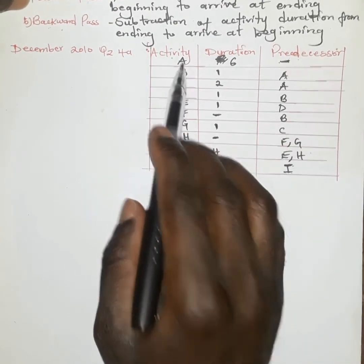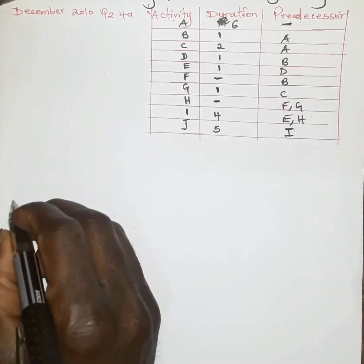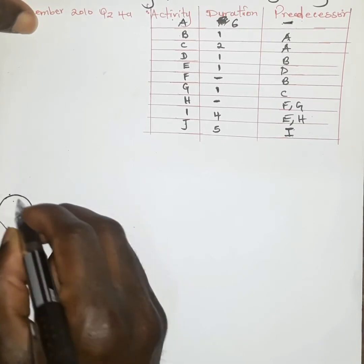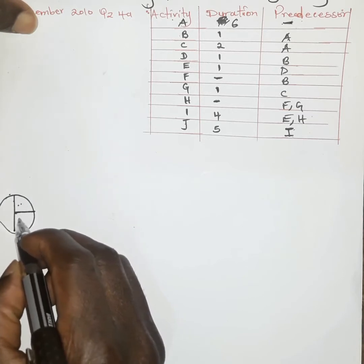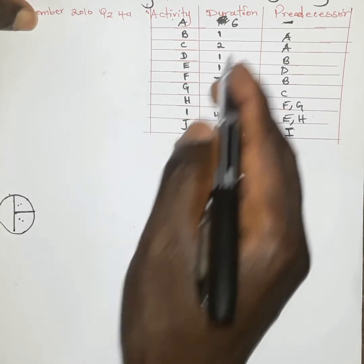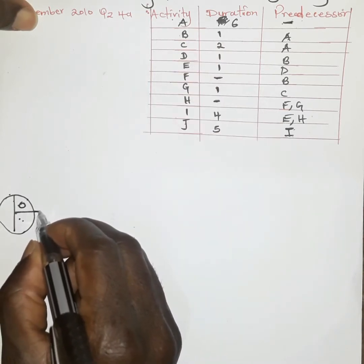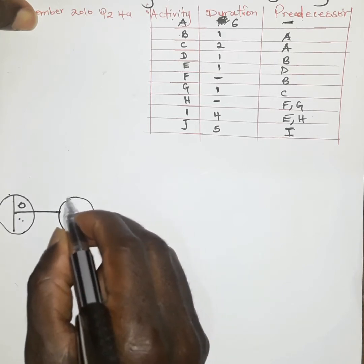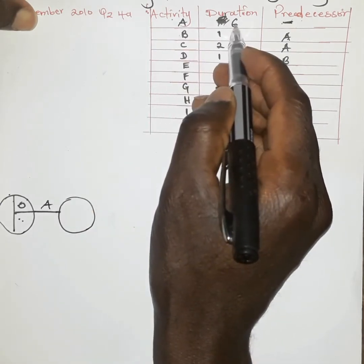When we start drawing activity A, because it does not have any predecessor, we are going to begin from zero. We normally have the earliest starting node and the latest starting node — an activity can either start early or late. Because activity A is zero, we begin from zero, and we highlight activity A as given here. Its duration is six weeks, so we write six.